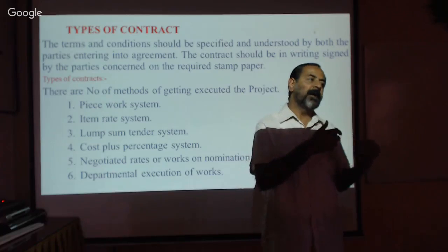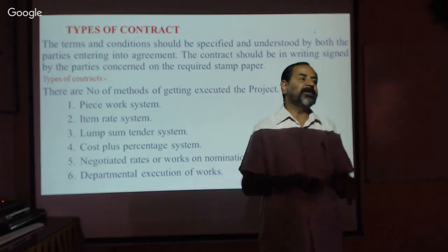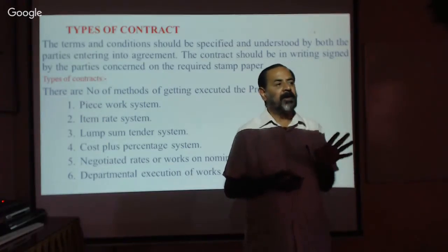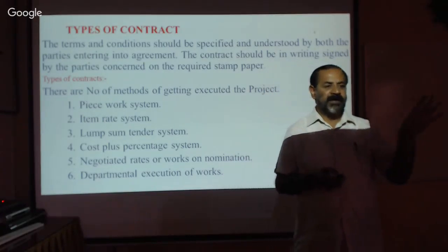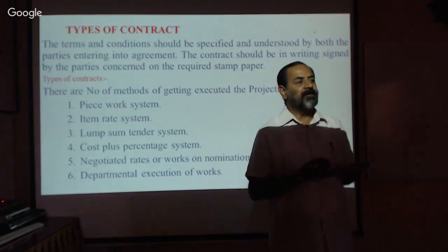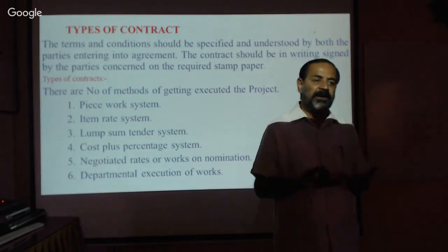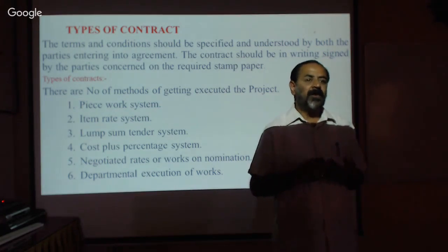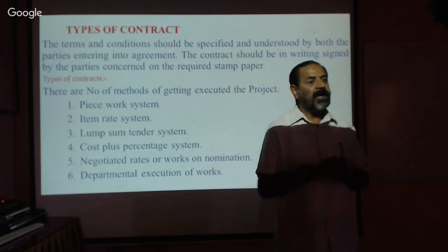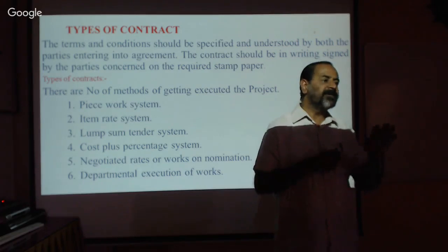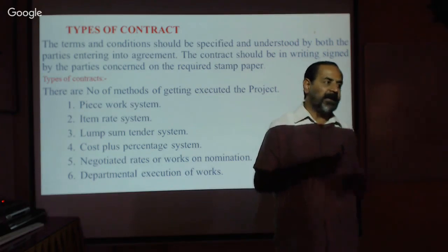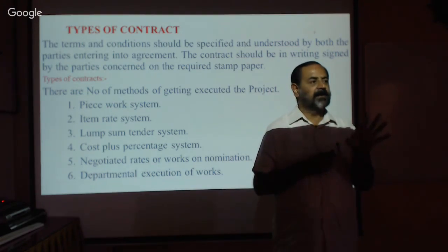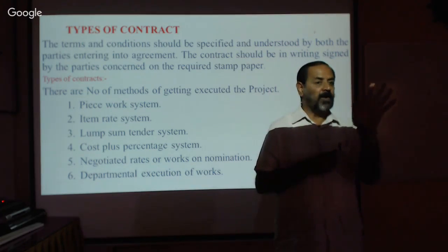You get into an agreement before commencement of the project. That is one of the best methods we can evolve, and there are no conflicts. Whatever the owner wants, we can build. The only thing is you must record regularly without missing. If something is missed, you will lose that money. Therefore, every day you have to record. Your supervisor should record and maintain the accounts properly.